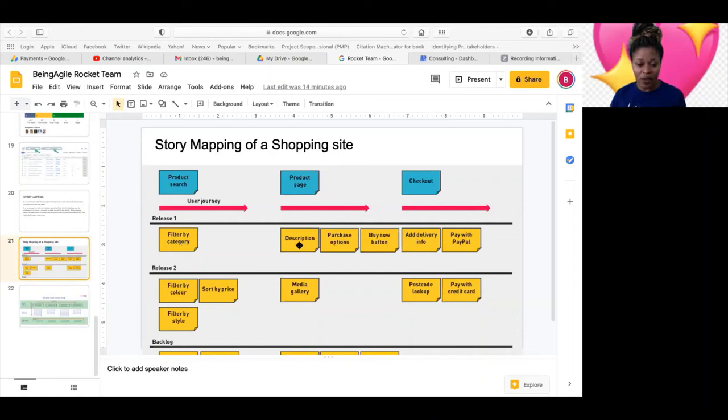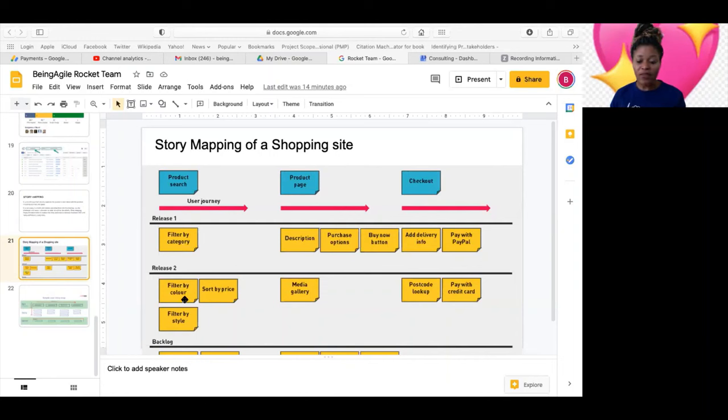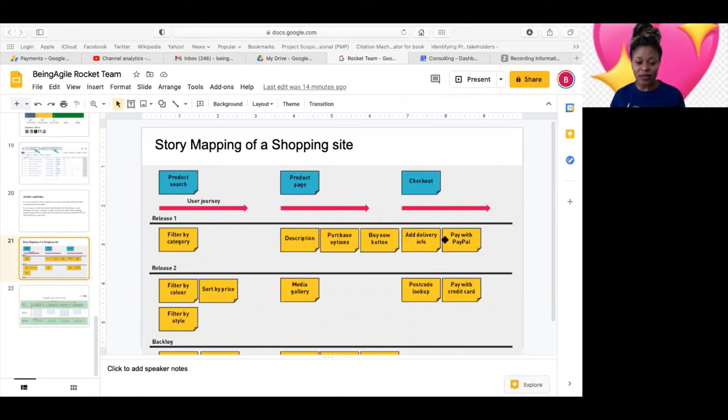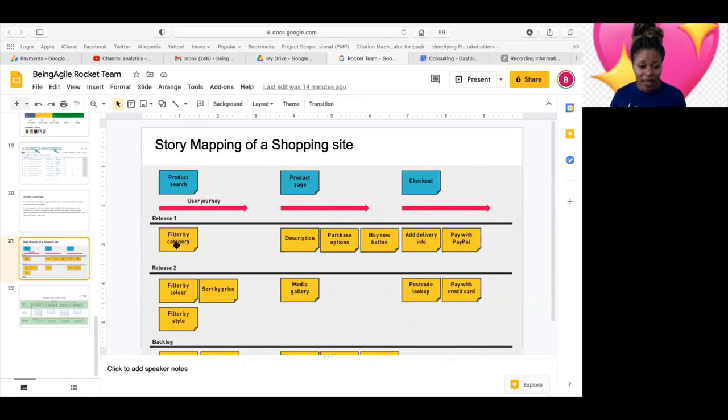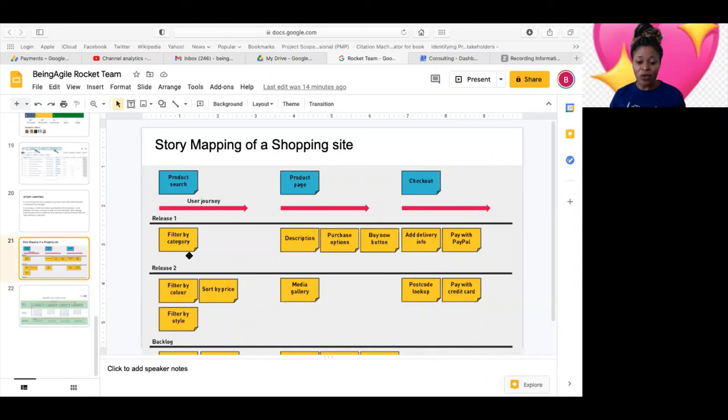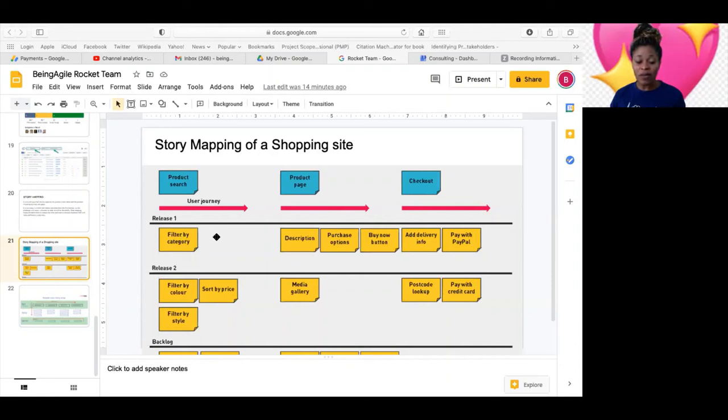Because now you see that, you will need to filter by category before you can even filter by color. Because this is what they plan to release in the first release. They want to release all of these in the first release. So now just by doing this and sticking all of these, you understand that, you cannot go and be working on user story filter by color when you've not completed user story filter by category. So now you will know how to prioritize. So you will know that, this filter by category should fall in the first sprint. So this is the main value for that.